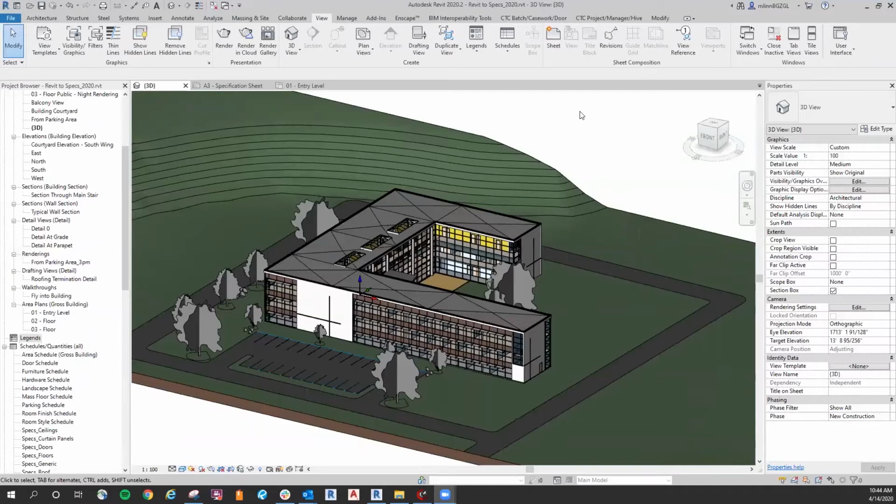Traditionally, an architecture firm will design and develop a project predominantly in drawing form. The design is further developed throughout the design development and construction document phases. Ideally, the spec writer would get involved in the design development phase too, but this is rarely the case. This is due to the demanding workload and responsibilities of architects. The specs are typically tacked on a week or two before the final deadline.